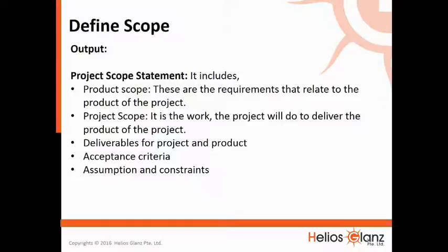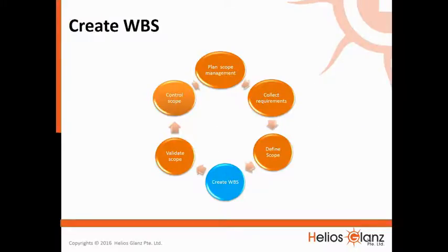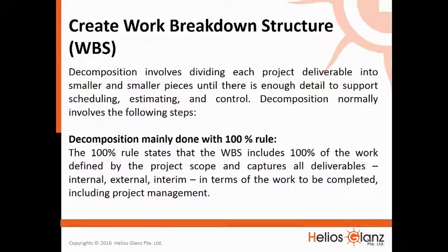Deliverables of project and product. Acceptance criteria, assumptions and constraints. Create WBS. Create work breakdown structure. Decomposition involves dividing each project deliverable into smaller and smaller pieces until there is enough detail to support scheduling, estimating, and control.